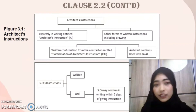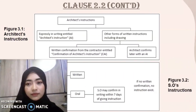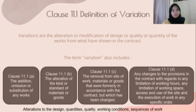This means an instruction will not take effect unless entitled as AI or CAI, regardless of whether it is in writing or otherwise. Here you can see the differences between the Architect's Instruction and the SO Instruction. Clause 11.1 - Definition of Variation. Variation is the alteration or modification of design, quality or quantity of the work from what has been shown in the contract. This includes Clause 11.1a - addition, omission or substitution of any works; Clause 11.1b - alteration of the kind or standard of material or goods; Clause 11.1c - removal from site of work, materials or goods formally in accordance with the contract but which have been changed; and also any changes to provisions in the contract regarding limitation of working hours, limitation of working space, access and use of the site, and the execution of work in any specific order.